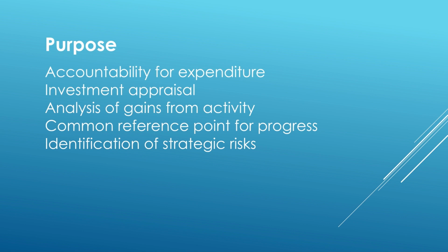And part of that business case purpose is not just, can we deliver this project, is it worthwhile, but a consideration of those more strategic risks. What happens if we do this project? How will that impact our future as a business, our ability to operate, but also what happens if we don't do this project? So consider the introduction of the GDPR legislation, where many organisations were forced to undertake changes within their organisation to ensure they would be compliant with the law.